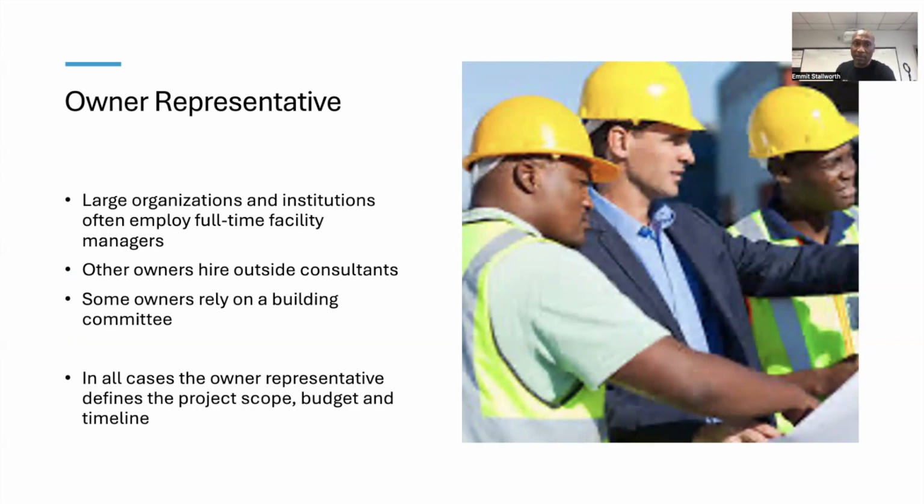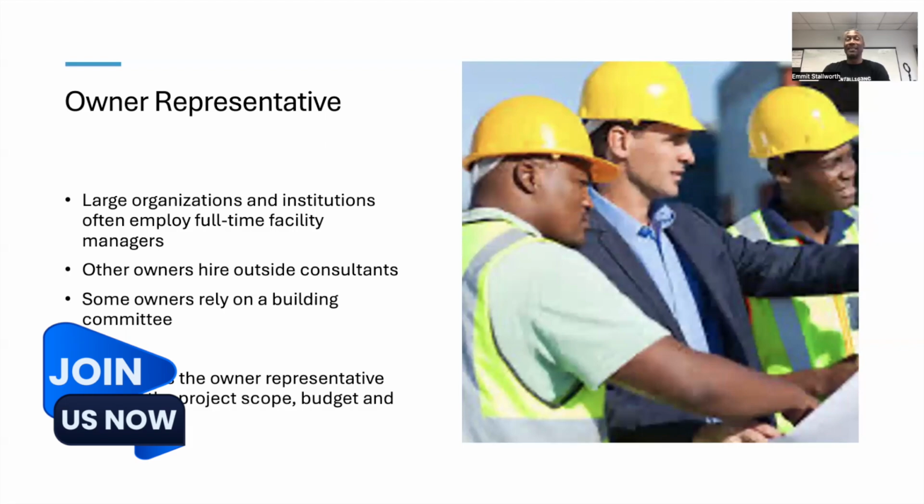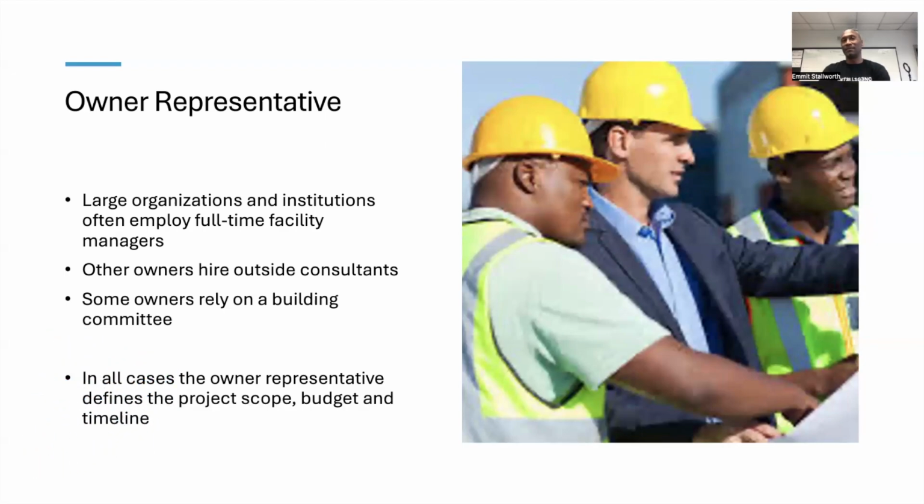Okay. Other owners hire outside consultants, which is another thing that gets done. This is another way people can make money, serve as consultants. I did that one time on a job, man. I served as a consultant, but according to the Home Builders Licensing Board, even if you're serving as the consultant, when you read the definition of home builder, you're still a home builder. So you can't just say I'm consulting. I did that. I was like, I'm just consulting this job. But then probably midway through the job, I started reading the law for the Home Builders Licensing Board. And it says even if you serve as a consultant, you're still the builder. All right, some owners rely on a building committee.